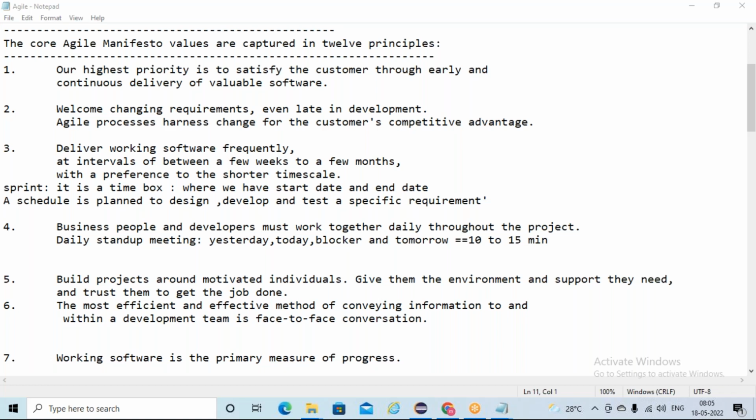By the time the sprint one activities are going on, when it comes to the end, the sprint two activities will be taken from the client, like what in the coming sprint we need to develop. Our business analyst team will follow up with the customer meanwhile, and they will collect the coming sprint user stories. Meanwhile, our development and testing team will concentrate on sprint one. By the time we finish sprint one, our sprint two user stories will be ready. By the time we finish sprint two, our sprint three user stories will be ready. So we go like that continuously. We know where we stop.